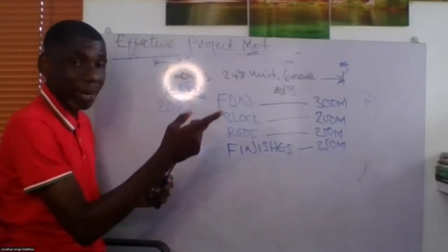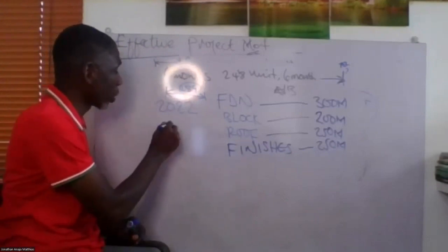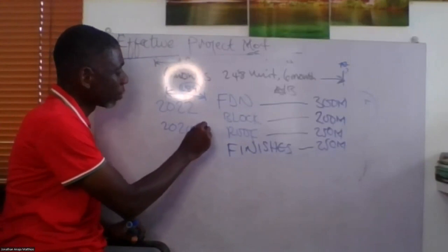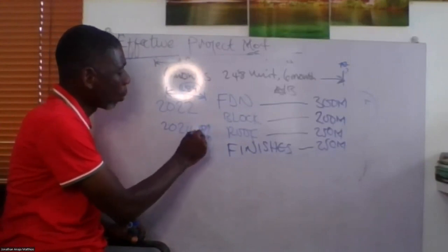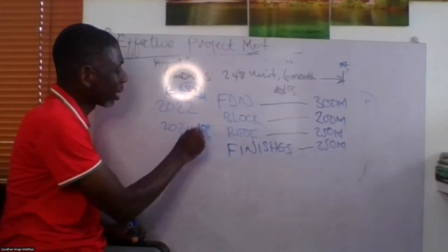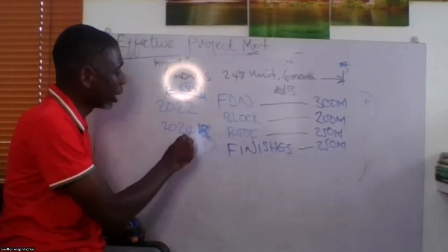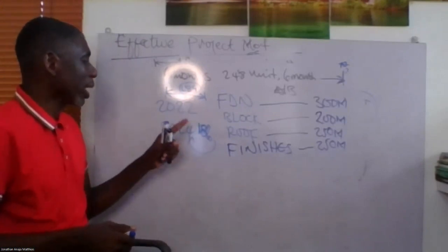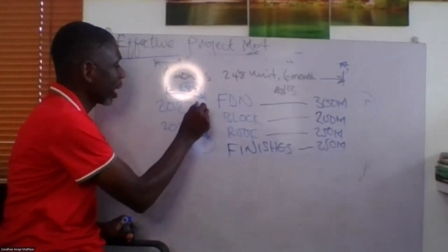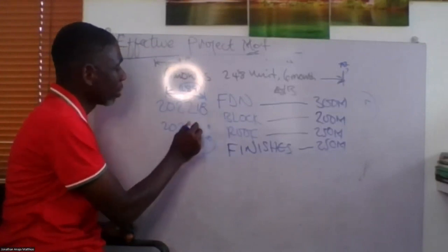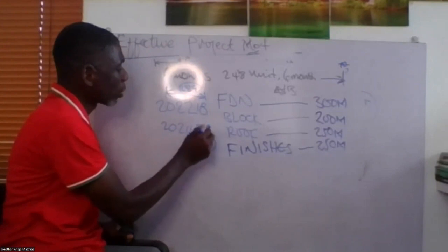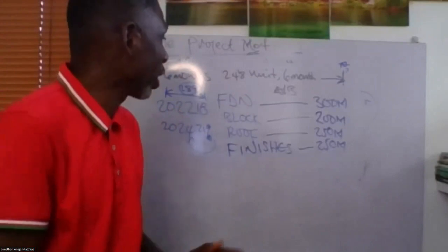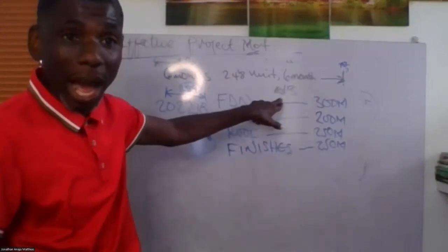How much was my cost of material? Then how much is the cost of material in 2023 or 2024? Let's assume it's about maybe 18%, for example. So I can now probably liaise with my accountants and see how we can build in the inflation factors. If inflation was 18% here, and inflation now is maybe 21%, I have a difference of 3%, right? It means I will have to cater for that and then mark up my 1 billion and give it to the client.